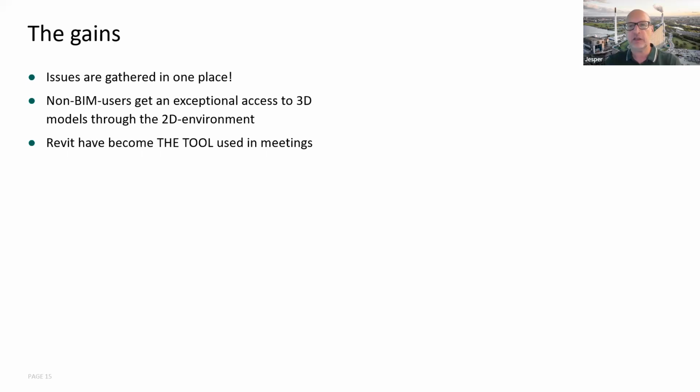You can set up a search or a filter in Revizto and filter down maybe a couple of issues, maybe 10 issues, tag them for a meeting date or something, and then you can very quickly in a meeting identify these 10 issues that you want to talk about in that specific meeting. We don't use BIM managers in the meetings, and now the project managers can handle it themselves. We have these phase reviews. They have become digital. Everything is in one place. Really cool. A lot of project managers and reviewers are very happy with that.